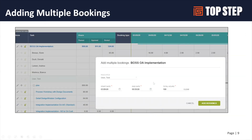You're not limited to entering weekly amounts. When you go to create the booking, instead of inputting it week by week, you can start with a start and end date and total hours in between. That gives you a starting point, and then you can go in and adjust the hours week over week in the worksheet view. For example, we use this to create placeholder projects for upcoming work, assign some generics, and book a peanut-butter spread of hours between the estimated start and end date. Then as the project becomes clearer and resources are assigned, we use this view to move around the weekly allocations.